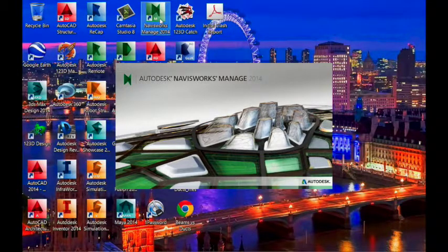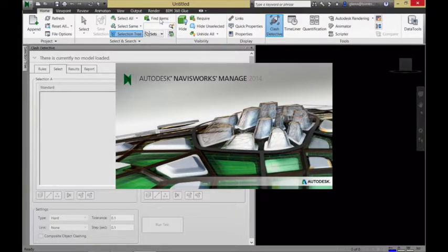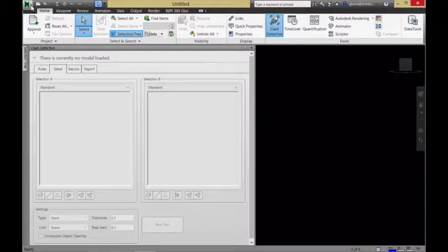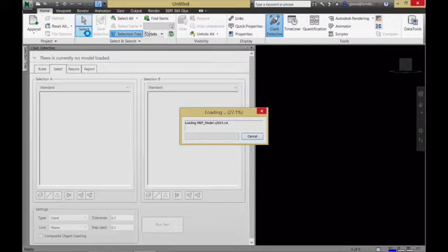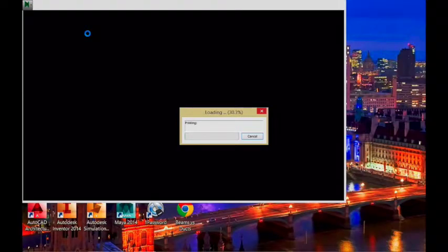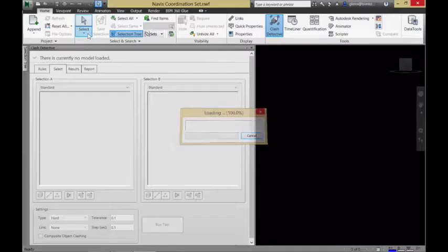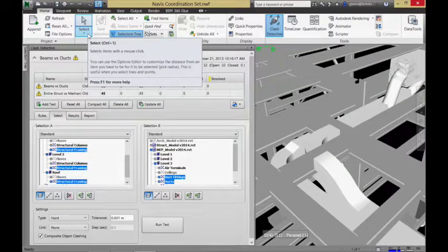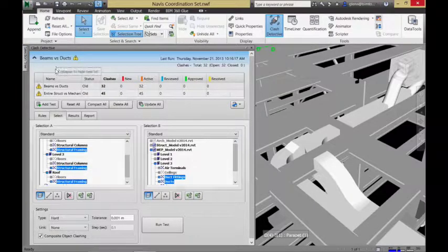Okay, since I've saved away the Navisworks file set. Yes, sorry, what you got? In practice, who's the one? Well, that's a very good question. It's really whoever is the BIM coordinator for the entire project. Often that person will be someone working for the construction company or some firm that's coordinating the entire project. But that's a very loaded question about who actually does coordinate it. It's just something that has to happen. The team has to decide who that's going to be. But almost every big project will have someone explicitly known as the BIM coordinator, and they're ultimately responsible for all that stuff.